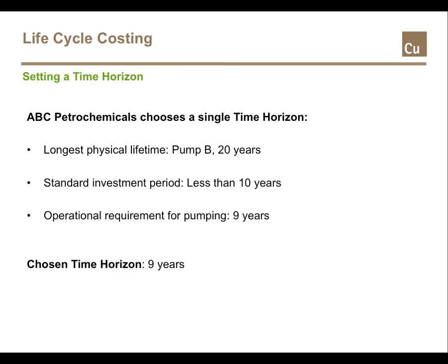First, with 20 years, pump B is the alternative with the longest physical lifetime, so Leonard's time horizon will not be longer than that. Second, the company's standard investment period, he is told, is certainly less than 10 years. Who knows whether the company will still exist by then? And third, he checks how long this highly specific pumping system will be needed for operations, and he's told only 9 more years. Leonard decides to restrict the time horizon to 9 years.